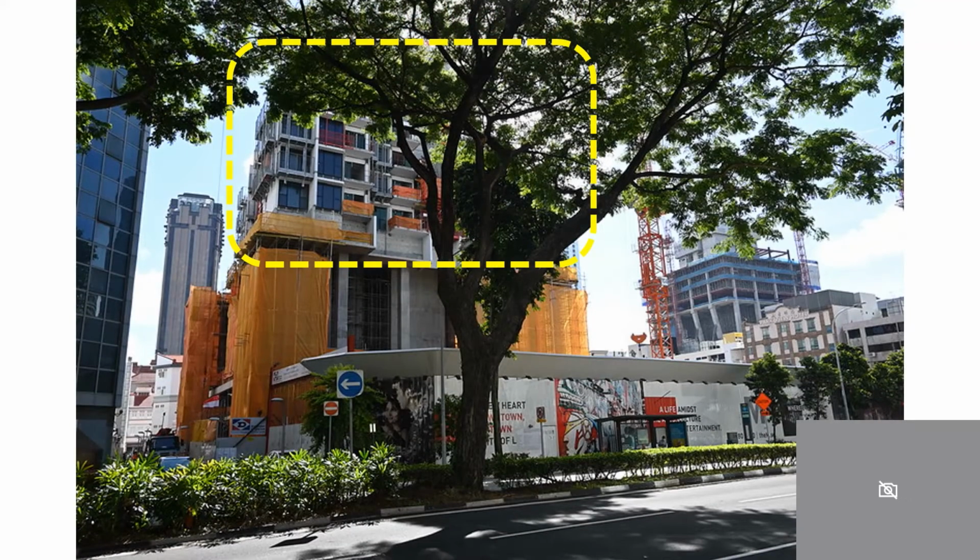Once the bottom structure is done, going up from here, the next step will be casting a transfer deck, which is in this portion. Then after that, on top is something like a Lego: one story, two story, three story, four story, just counting and going on. All these units are a PPVC system, fabricated offsite, then brought to site for setting and hoisting.